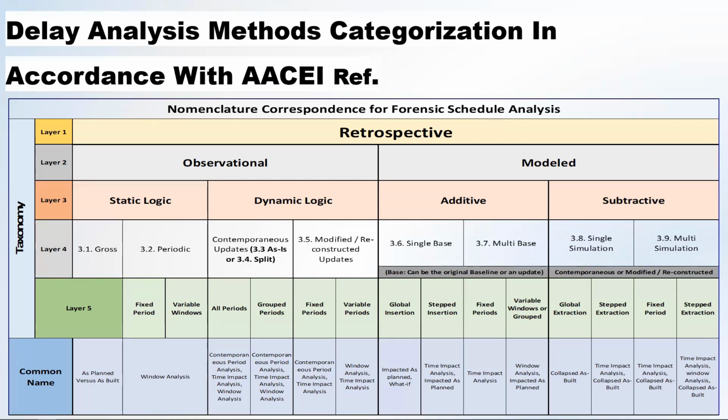How can this come? It can come in engineering projects. We use some fixed sequence to represent engineering projects. We can go for linear projects. We are talking about sections that are not being changed from section to section, like a railway section or a water line section or a sewer line section, something like this. This tends to be static logic. Be aware that I'm not talking about delayed activities. Activities can delay, but the sequence will remain static.